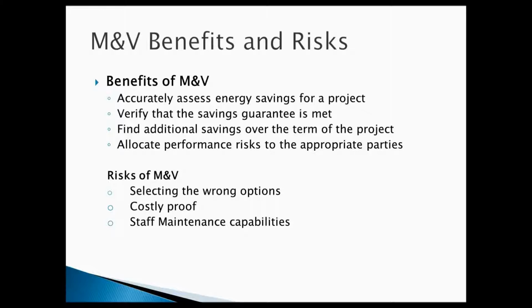How often you get the report? Most of the time it's annual. That can be negotiated, but remember, measurement and verification services cost money, and it is a separate check. After they start the measurement and verification services, you write a check for those services, and it is included in the savings, but it is not included in your payment to your funding institution.